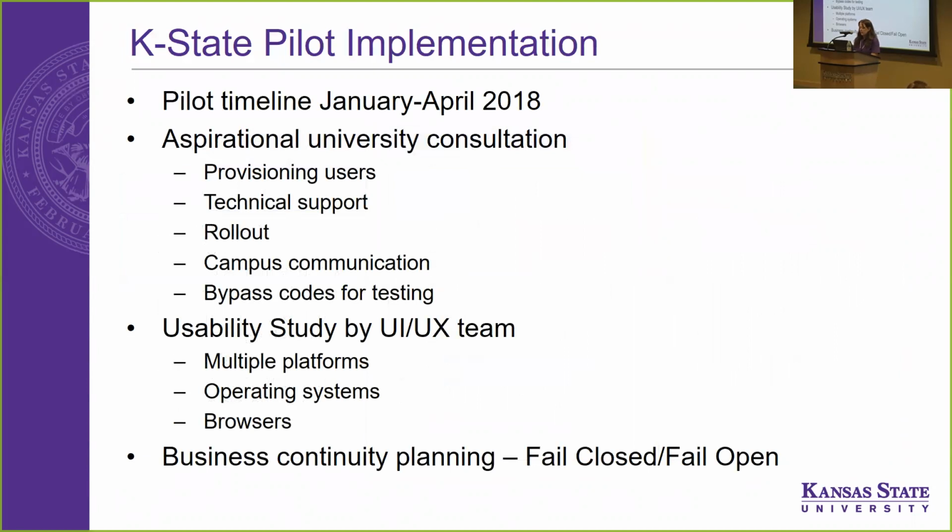And one thing we did learn from one university is that during online exams on Canvas, some departments had the students check in their phone at the door. So then they would come and take their online assignment and not be able to have their phone to authenticate into Duo. So that was a good lesson learned to provide these bypass codes. So we really appreciated the university consultation.